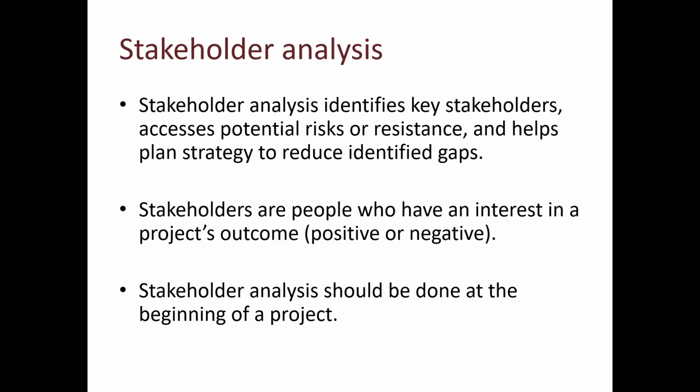No, we don't have this definition here. That's correct, but away from Six Sigma. In Six Sigma, a stakeholder is anyone who can affect my project. I don't care about affected by. Anyone who can affect my project. No, they will not carry out the process, who carry out the process as a cross-functional team.